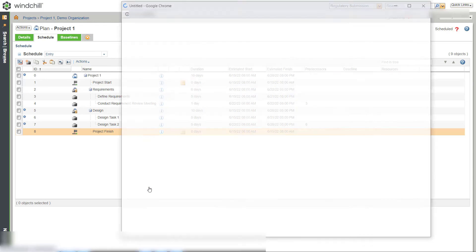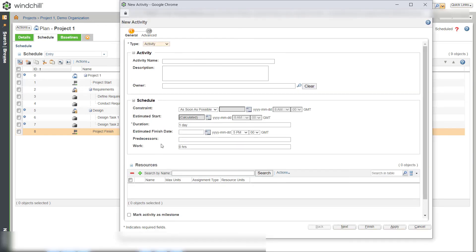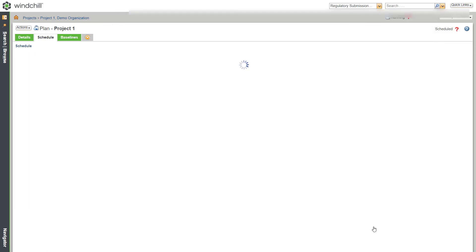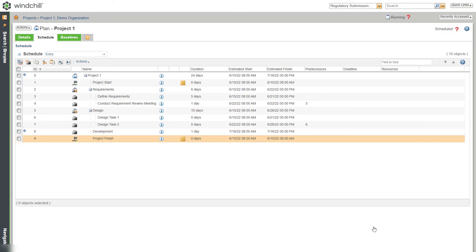Similarly, let's create an activity and child activities for the development phase. Here, we want the development activity to start only in the next month. For this, schedule it as Start No Earlier Than, select the date and then click Finish. Thus, the activity will not start before the specified constraint date.